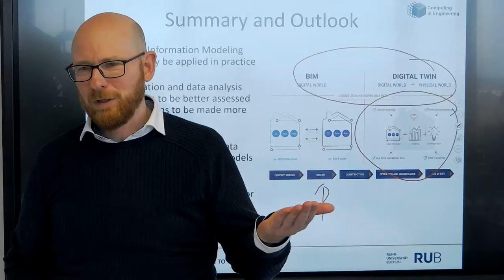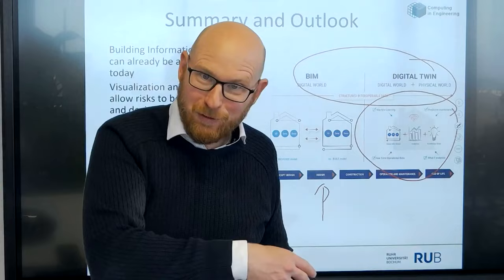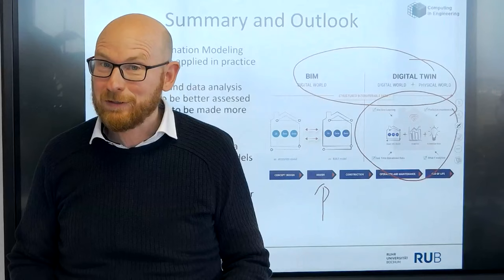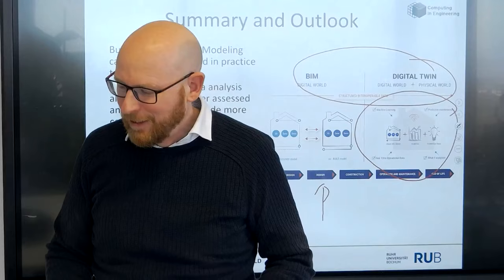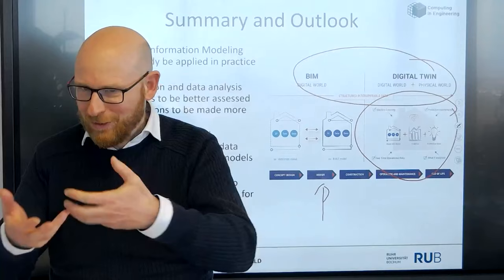You have the model and you define your schedule and you bring it together, and then you have a certain data format where you can store it, and only this format you can reuse. So you cannot transfer it maybe to a different app because the other software cannot use it. So there is missing, of course, for example, an open standard for 4D. I've not seen anything supporting something like this. And then maybe you can also create applications for your tablet and so on. I think this is the biggest challenge at the moment, because everything is more or less closed and cannot be reused.